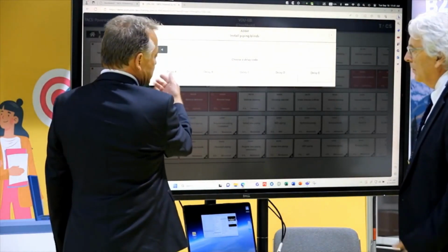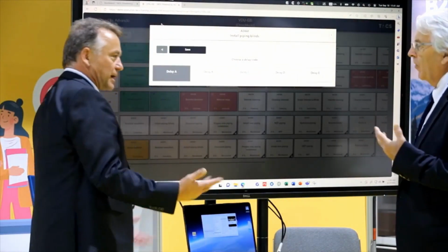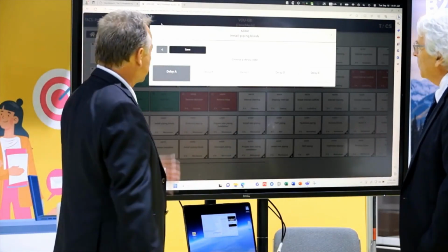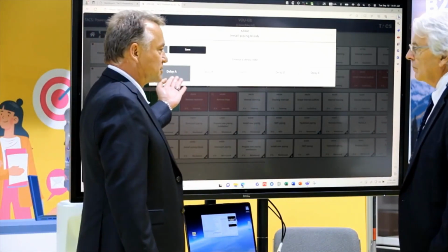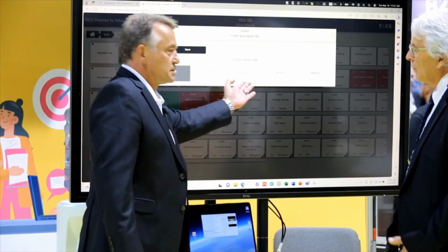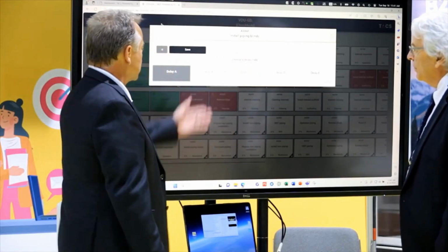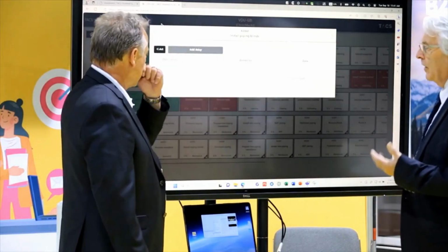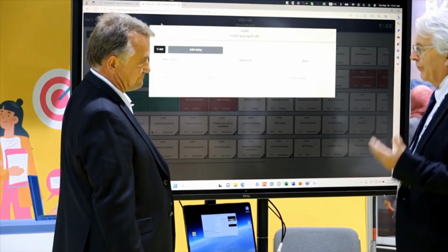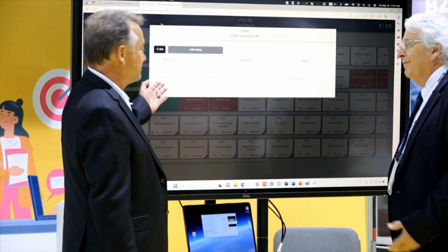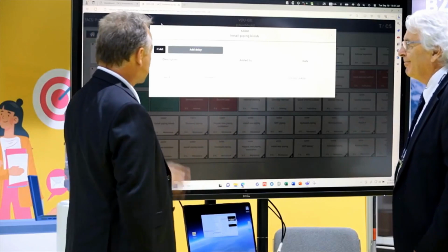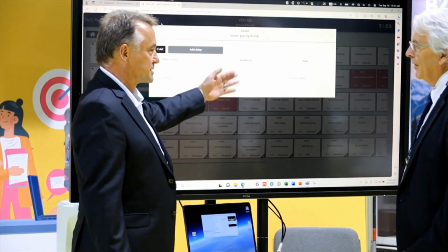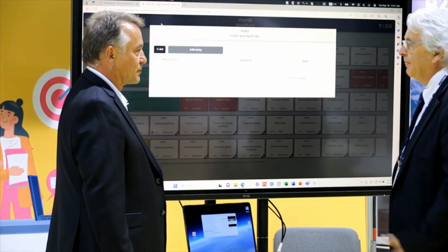Those codes are defined by the planning exercise, through the client. So this would be perhaps insulation not removed, scaffolding not installed, parts not ready, whatever, parts delay. That enables the client, the owner, to see reasons for delay. And it builds a log of the delays, lots of delays, able to tap a pattern.